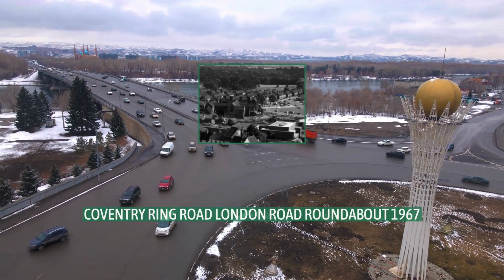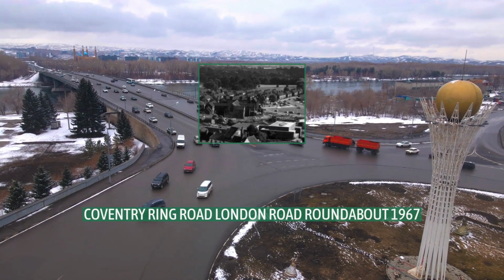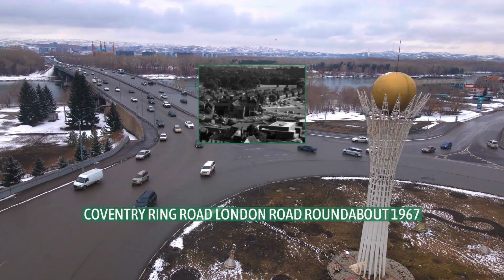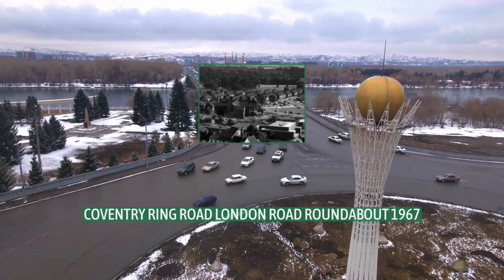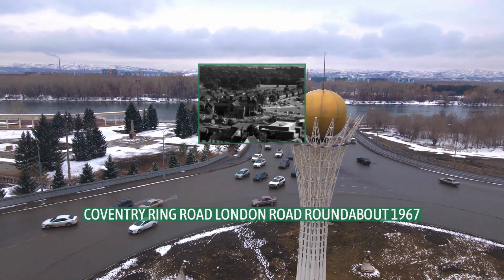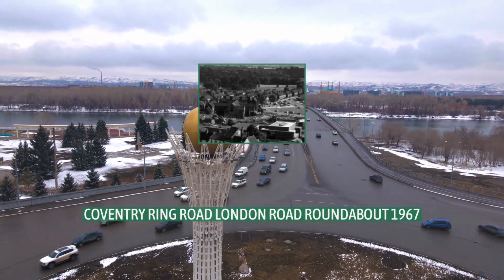In 1961, the council began a thorough review of its road transport policy. The city's planning department had begun to question the entire Ring Road concept, arguing that it was not the most effective way to reduce congestion and created a damaging divide between urban communities and the city centre. A fresh traffic study was launched, producing a development plan for the transport needs of the whole city, which continued for much of the next 10 years and produced several large volumes of results.